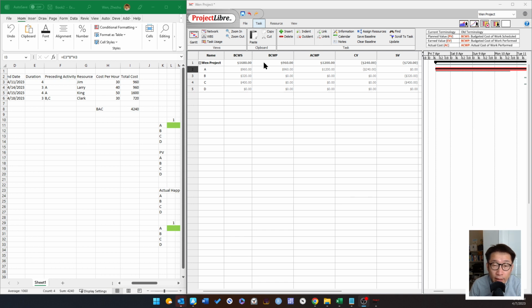Okay, and BCWP is budgeted cost for work performed. Therefore, this is your earned value. ACWP is actual cost for work performed. Therefore, this is your AC. So you're looking at PV, EV, and AC. There are some people who are educated on the earned value method using the old terminologies, and some people like you guys have learned this using the newer terminologies.